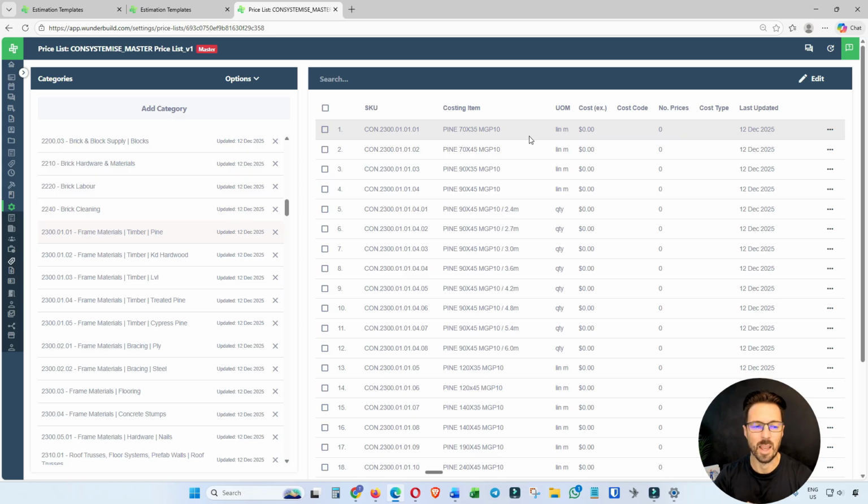And I'll do the demo now, and you're going to see how quickly and easily not only can you do a takeoff, that takeoff links to the costing, potentially links to an assembly as well, which you've got all my assemblies, and then also how it links to this master price book here, so that your estimate is auto-populating, not only with quantities, but with the actual costing itself.